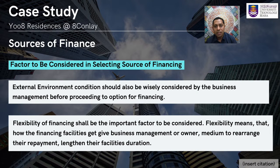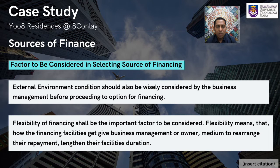For the factors to be considered in selecting sources of finance, several factors need to be considered in deciding the appropriate source — management shall wisely consider according to priorities. The first is external environment conditions: the COVID-19 pandemic and unstable domestic political scenarios might give greater impact to the whole economy, influencing business activities such as reduction in customer volume, slower construction progress, and delays in receiving inventory. The second factor is flexibility of financing — how the financing facility allows management to rearrange repayment and lengthen their facilities.